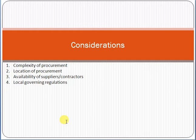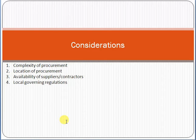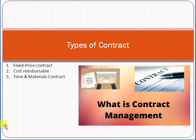Procurement has some complexities we must consider — for example, if you want to procure hardware from outside the country. We also consider the location of procurement, how you will deliver the goods, the availability of suppliers and contractors, and which suppliers can provide what is needed. Very importantly, in whichever country you are working, there are certain government rules and regulations we must follow, including any applicable taxes or charges.